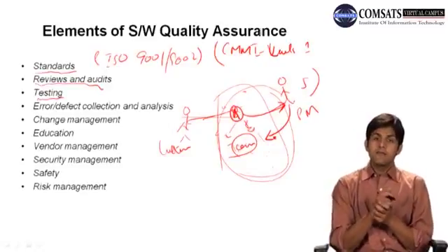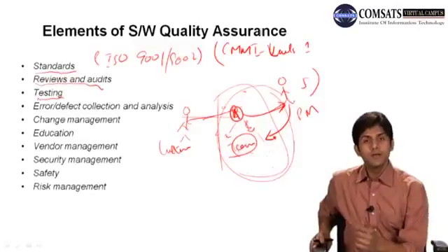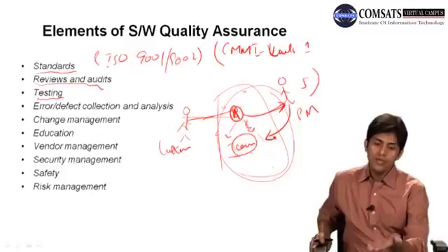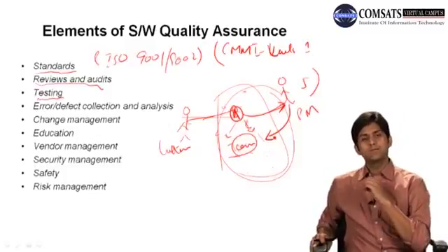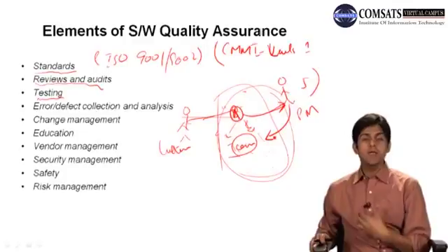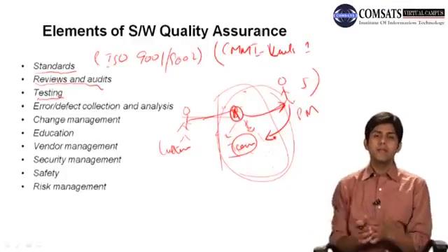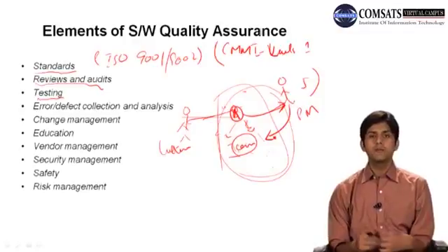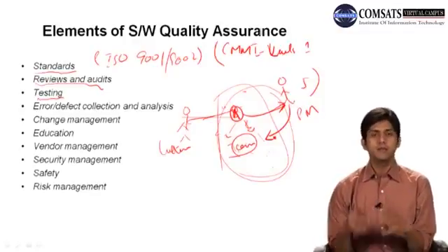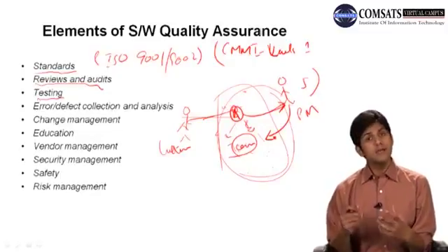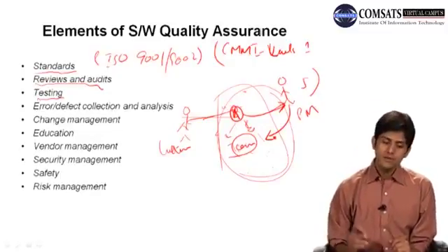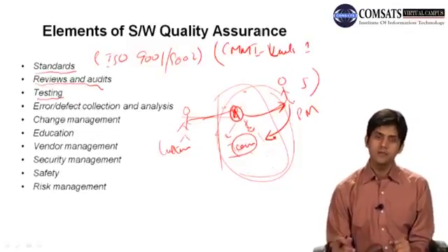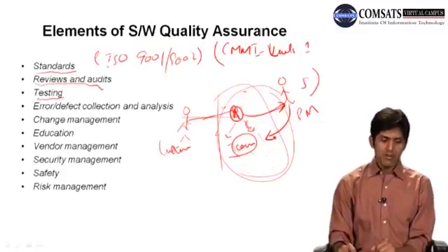ठीक है. But this would be the right way of doing it, and if we have proper change management procedures in place, then we will do that. Whereas what a mistake that this person A can make, that he can accept the change directly and he can make the change, और उसने project manager को भी inform नहीं किया, then the product would start performing inconsistently, or it can, it may not, but it can. ठीक है. And when it can, then it's a very serious problem. Okay. So there should be proper practices in place that how we need to manage changes that are being requested by the customer. Okay.